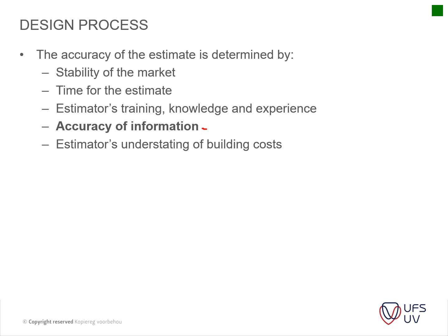The PVC or plastic expansion joint had a cost of about 20 Rand, 25 Rand per meter, whereas the stainless steel expansion joint with a rubber filling in between was almost 150 Rand per meter. So that was quite a big cost implication that we had there.